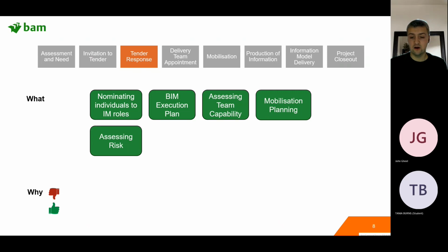We've realised the architect, for example, has never used BIM, never modelled in BIM, but the client has required an advanced BIM model. Can we upskill the architect? Can they acquire the software they need? Can they get their team trained in time? All of that. We would have to put in the risk assessment that until that's been done, that's a major risk.